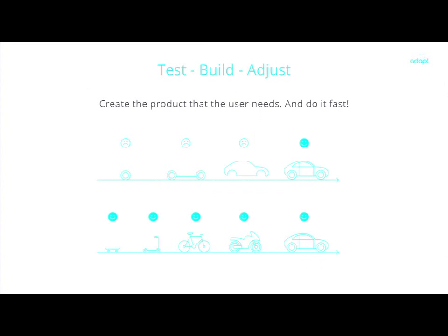And why is that a good idea? It is a good idea because if we do it on the old basis, we know we want to end up out here, and then we start to build this corner and that and work out there. That's not what we want to do, because there's a good chance that we have a misconception out here. So instead of that, we need to build something that will solve the basic needs of our customers. We're working with a concept called the minimal viable product. It is the least product that your customer can put onto market and get working.